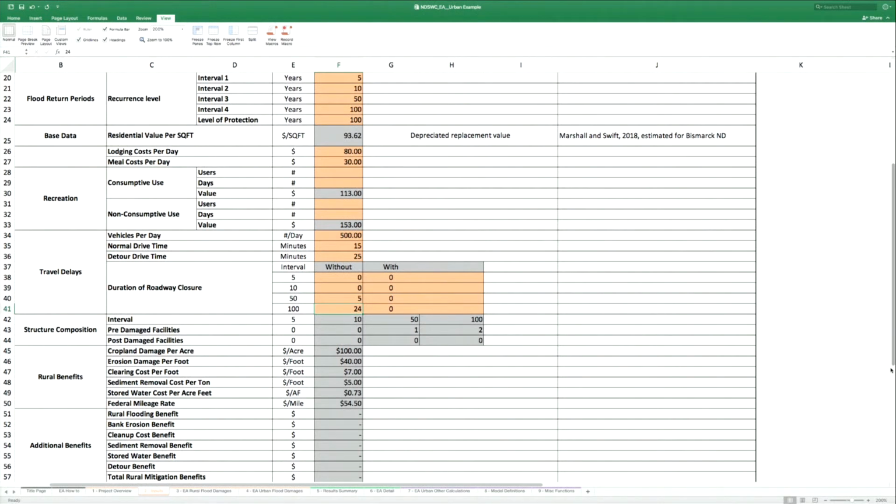So the previous question you brought up, if the property's bought out and they leave, how do you account for 5,000 people moving out of a city and you have those lost jobs or the lost income or however you want to say for a project area then? Well, that's your regional economic impacts. That's not part of the economic analysis test. That's one of the other factors the decision makers put in the overall decision-making process. Yep. Is the 5,000 people that moved away. Yep.